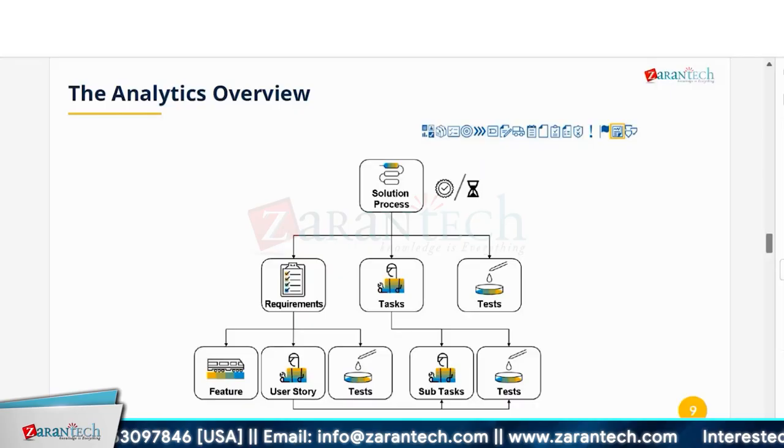You'll start your workshop based on scoping. The first thing would obviously be the scope of the project, and in the main scoping you decide what functionalities they are going to use, what you suggest and what you don't suggest. But after that you'll do the actual scoping: we have decided we're going to use Ariba, SuccessFactors, S/4HANA Public Cloud, but based on the customer's requirements, which business processes will be part of this scope? You're not going to use all the business processes. Not all customers can or will use all of them.